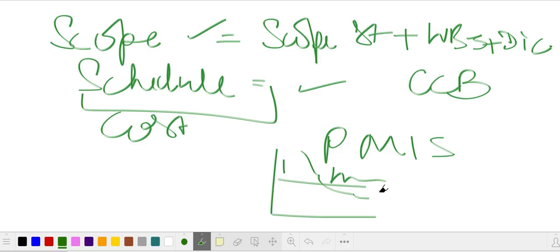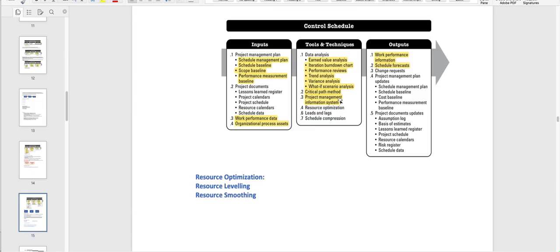The reason it shows is because we have so many activities and a time duration for each, and this burn down chart tells if any activity passed the due time or not. If it does, you have to go into that activity and see why it has not been closed or done. So that's it. This is the role of the burn down chart.